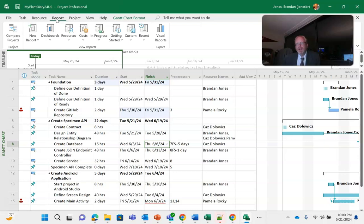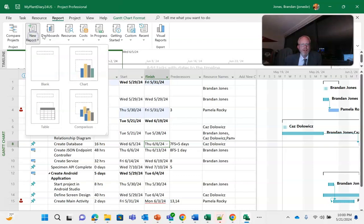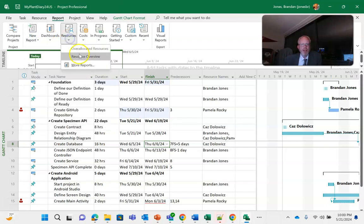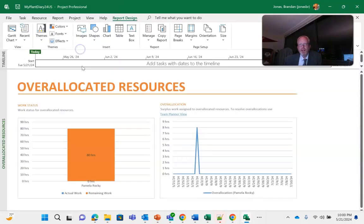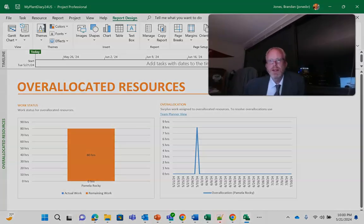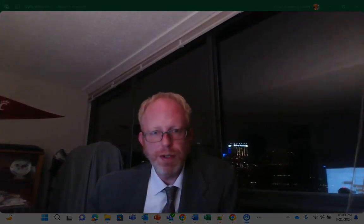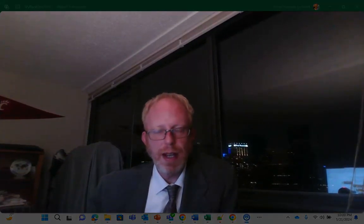What I might do instead is say okay, let me take a look at my over-allocated resource report. Let me see when there is an over-allocation and then I will see if I can maybe borrow somebody for that time or I can send that work off to another team to be done. So several things we can do to manage resources and over-allocation of resource.